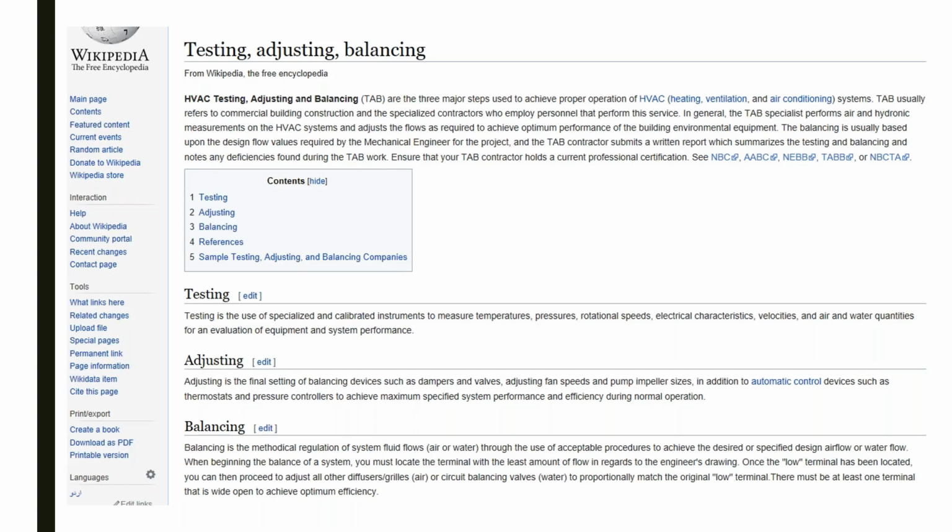If you go back to the original design, you get back to the original values, you're resetting the building back to the original, but you're not talking about its most efficient operating point. You're just going back to the original design. And so retro commissioning is going to focus on your most efficient operating point. You're right. Now, a lot of firms are not focused on that.